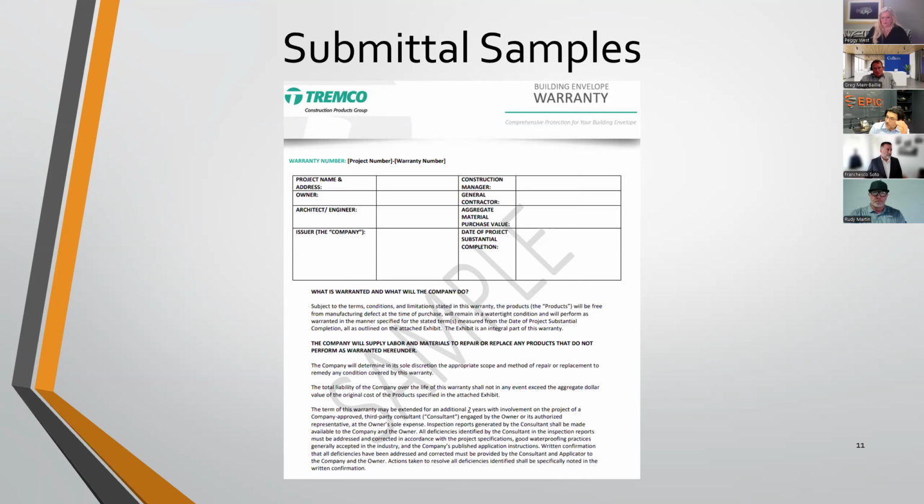And one important thing to note as well is, if you're going to do a large horizontal area, whether it be a roof or a pool deck, for example, the way that these areas are detailed from the design standpoint matters. For all the up, downs, left and rights, if I coat that all with the same product or the same manufacturer's products, I'm able to maximize the available warranty that you as the client can obtain.